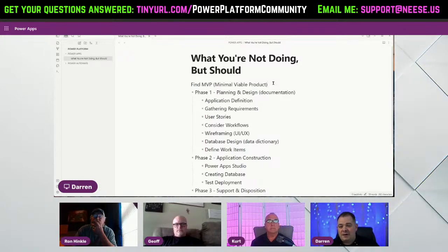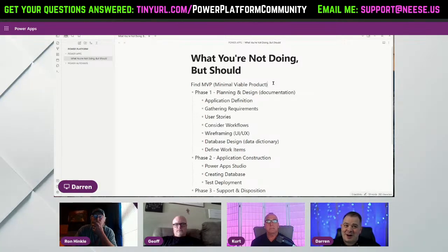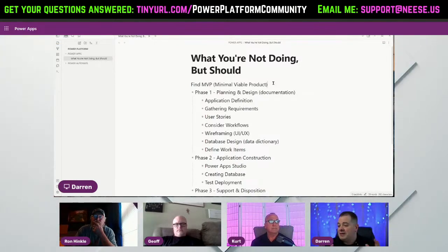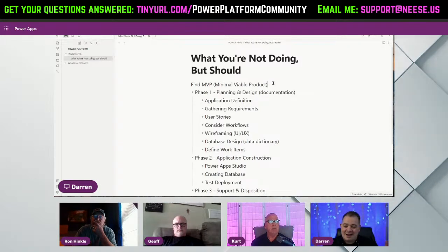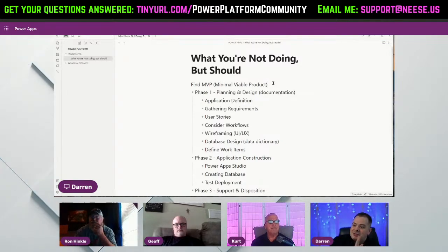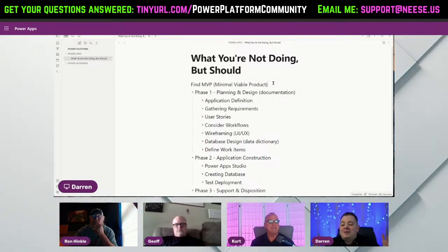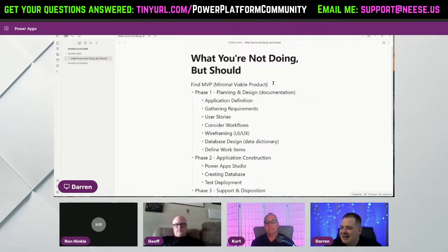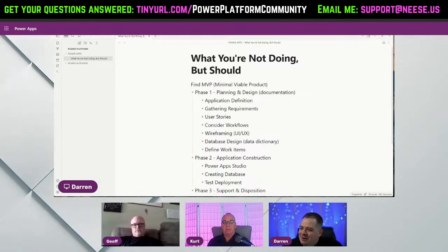And let's say you're a freelancer and somebody comes to you and says, hey, I need an app that, and they get excited when you start asking them questions, and you pull it all out of them. And it's like, hey, we could break this down into phases, because if you design the whole thing in order to give them an estimate, you're like, okay, that's going to be $25,000 and it's going to take 6 months. And they're like, what? I only have $1,000 budgeted. I'm like, okay, well, how about if we just start with phase one? Maybe we just create a really simple app for, let's say, $500, and it might take you 2 hours to do. Okay. And that's something that they could start to use.